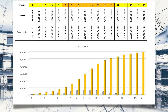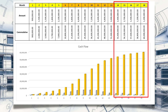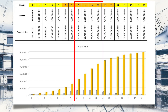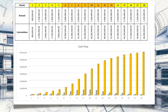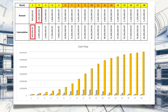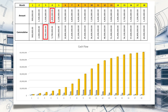From around month 14 the values decrease again: 2.4, 2.7, 1.5, 1.2, 1.2. In the middle you reached 6.6 and 7.2 per month. For the cumulative part: month one cumulative equals 900,000; month two cumulative is 900,000 plus 1.5 million equals 2.4 million; month three adds another 1.5 million for 3.9 million; month four adds 1.8 million for 5.7 million — and so on, until you reach the full 60 million of the project.